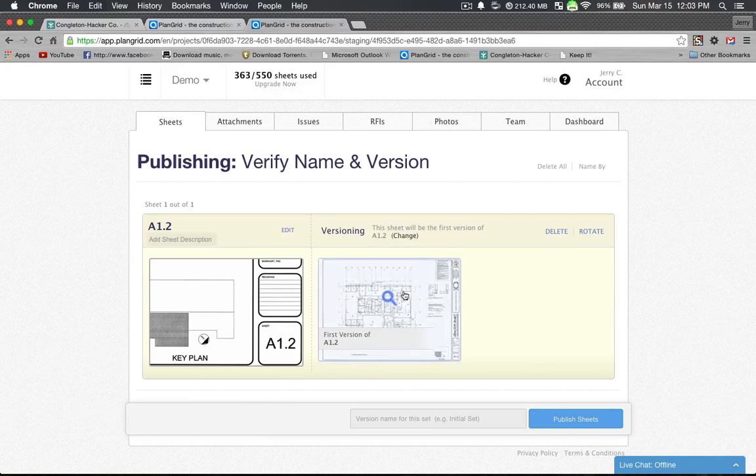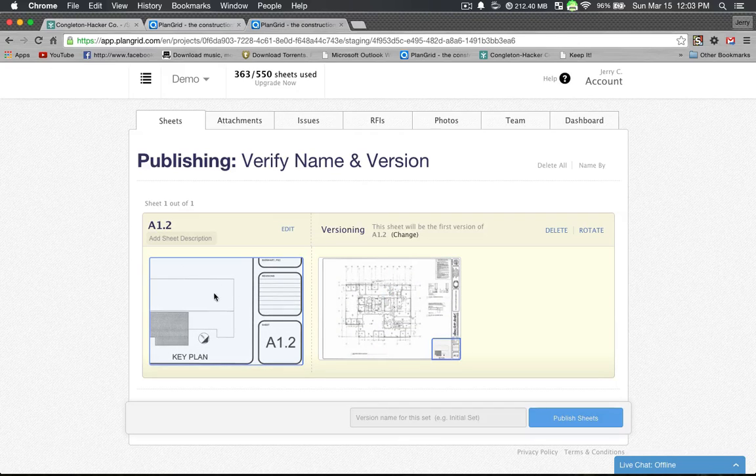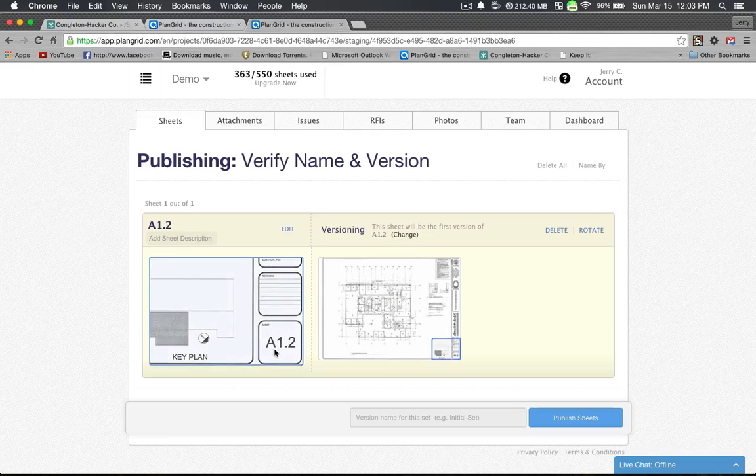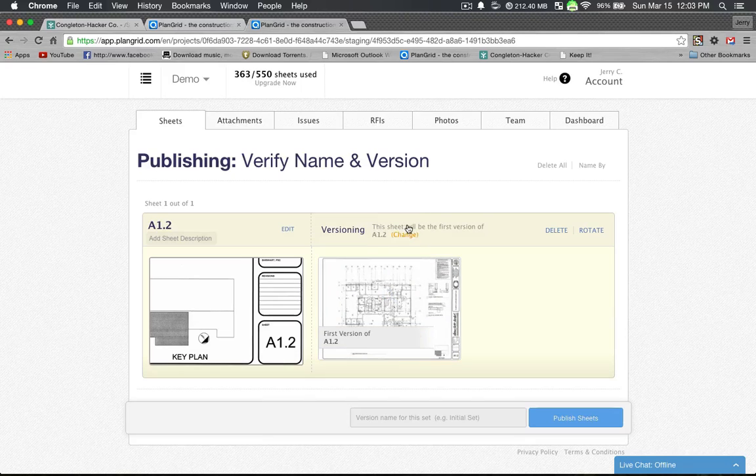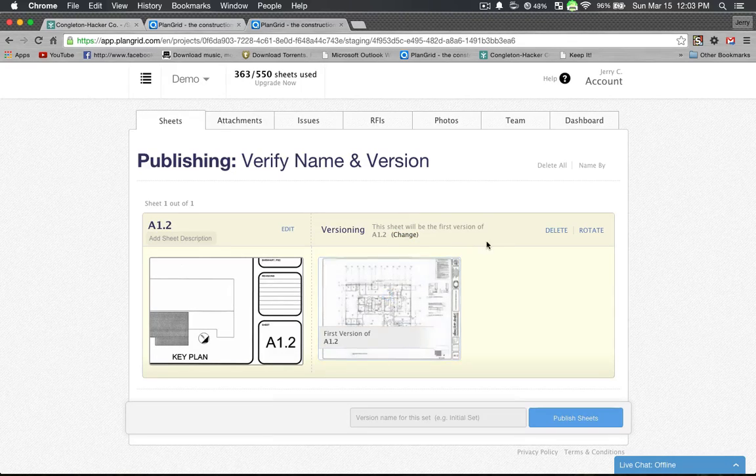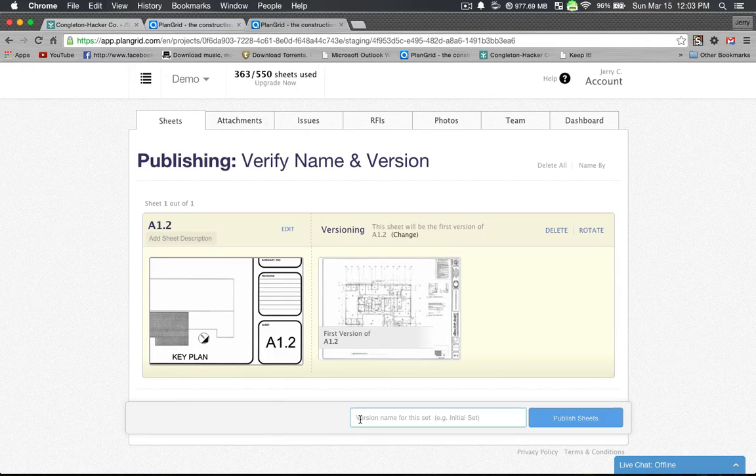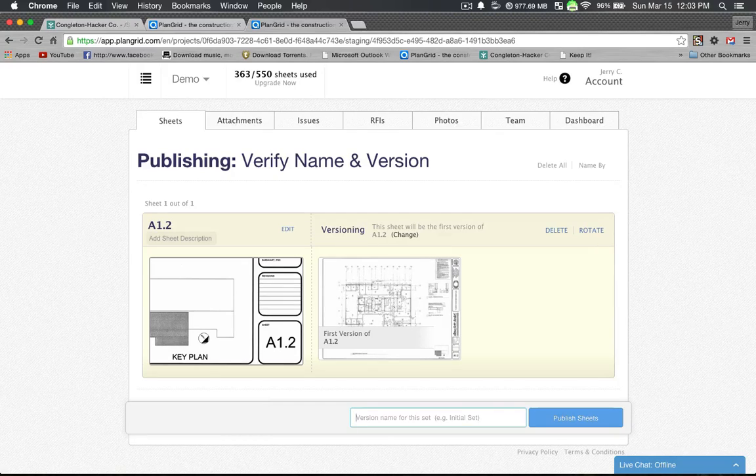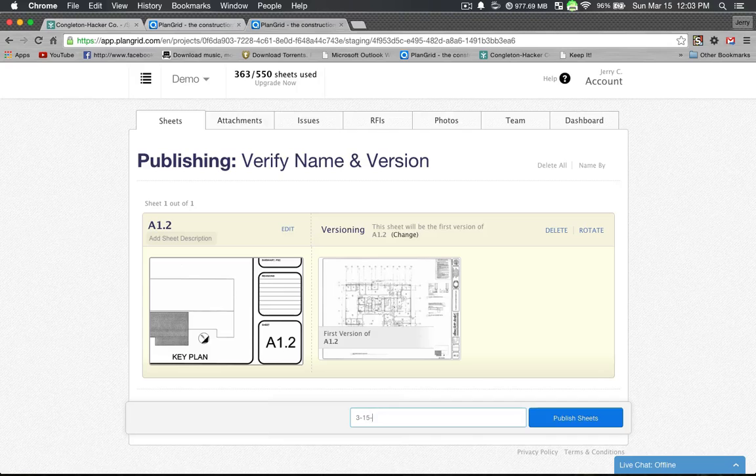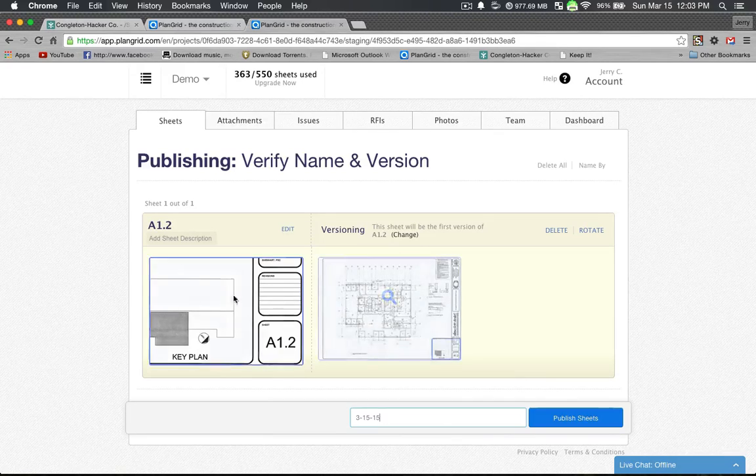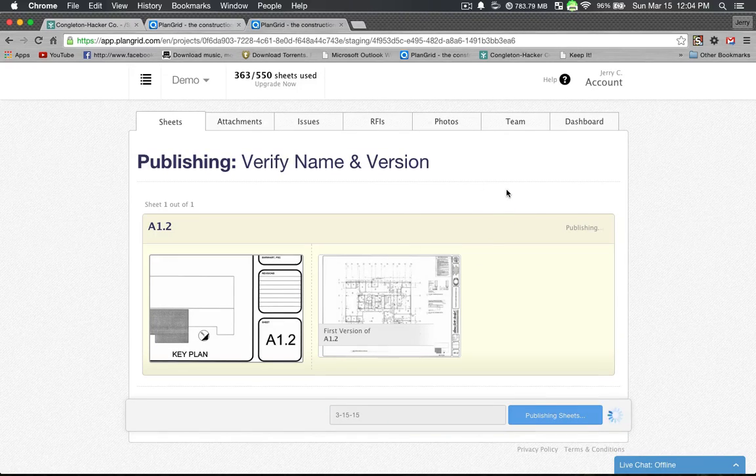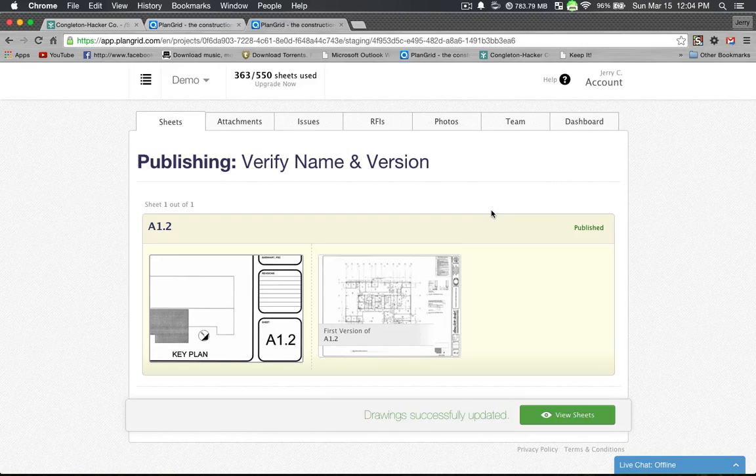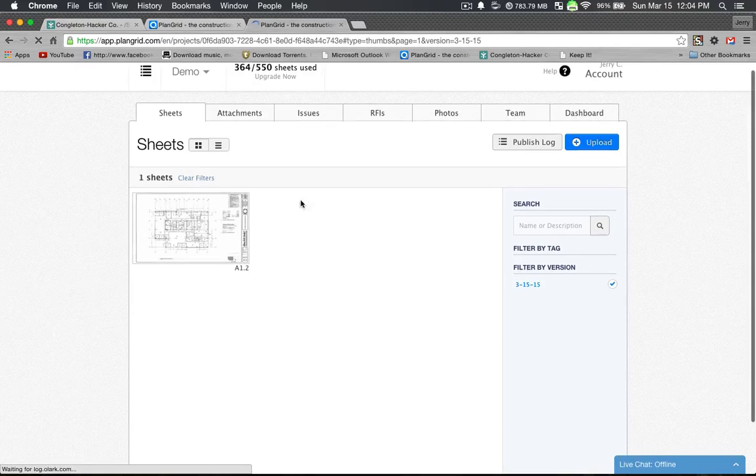Versioning is the first page like this you've added. Once the architect submits a revision or a new drawing, you can upload this. It'll have the same number, but it will paste it directly over top of this. So you have your new version and the old version underneath. And you can go back and forth between the two and look at changes that were made and that kind of thing. Everything on here is okay. You're going to say what version this is and usually I put the date. So it would be 3/15/15. So I know that on this date, this is the latest set up to this date and I publish it. Now what that does is it puts it on the server and lets you access it from your iPad.